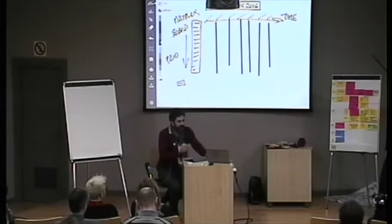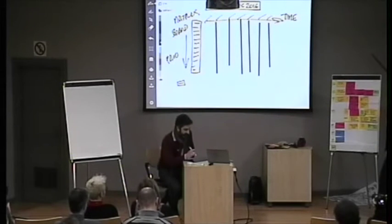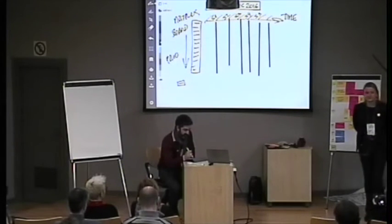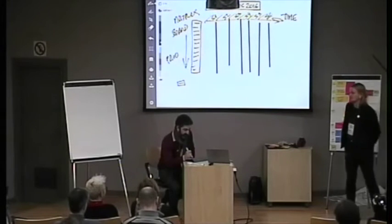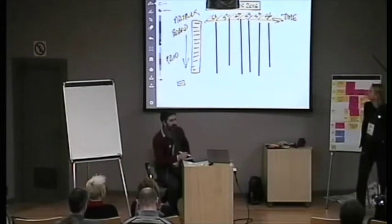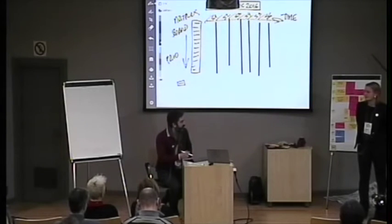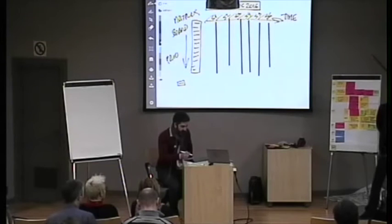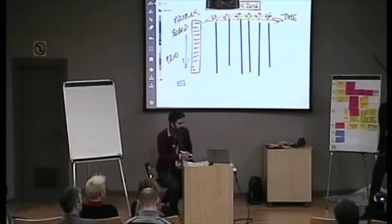So you visualize sprints — sprint one, sprint two, sprint three. I always use Scrum terminology; I'm a Scrum person and I'm not trying to reinvent the wheel. A sprint can be two weeks, a month, a week. We've noticed that with work outside of software, the week works every time. One week is our preferred iteration for this.